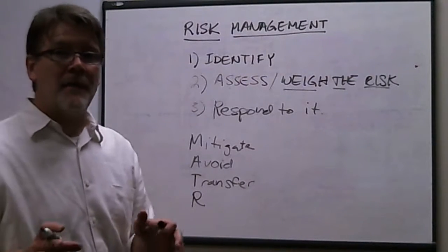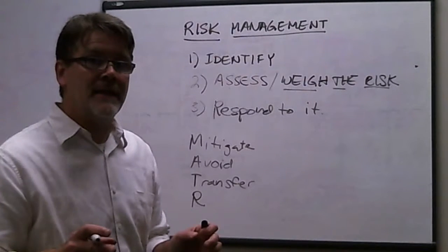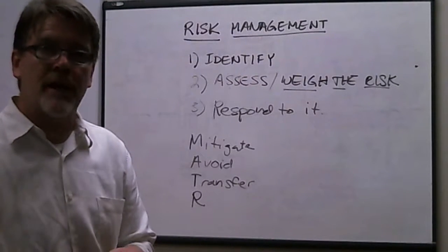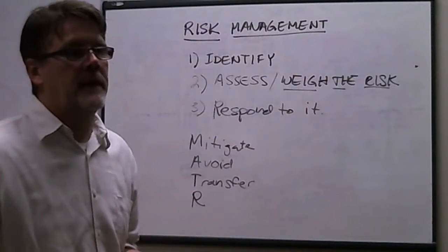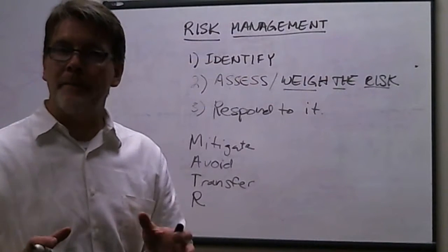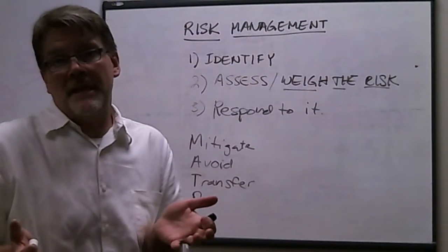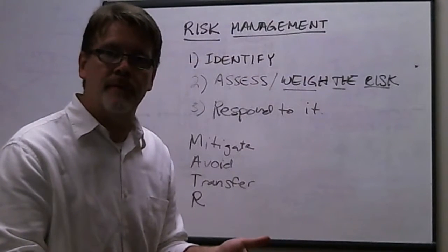In fact, I'm going to give you a heads up. One way to transfer risk is through contracts. If you as an organization are unable to self-perform a particular type of work, well, typically, as general contractors do, they will subcontract that work out.